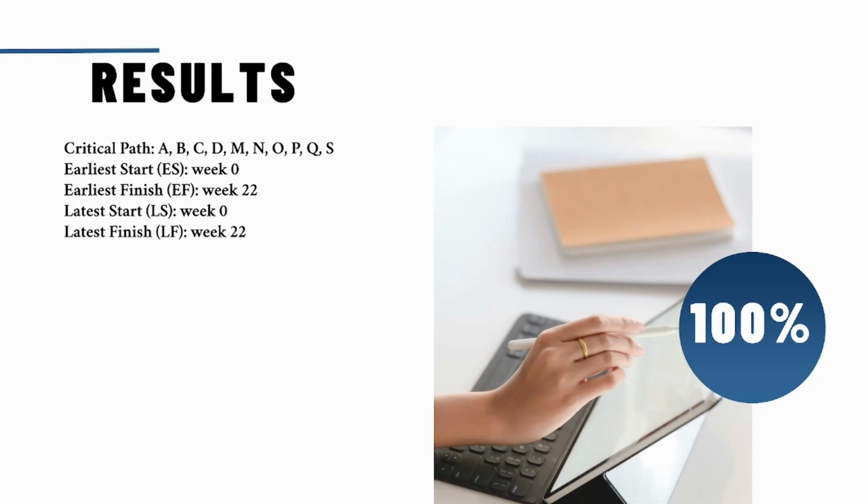Our results, as previously mentioned, are our critical path A, B, C, D, M, N, O, P, Q, S, and our earliest start being week 0, our earliest finish being week 22, our latest start being week 0, and our latest finish also being week 22.